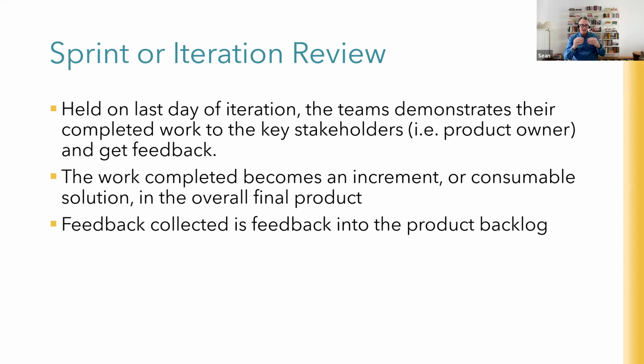Any feedback that's collected that requires major work that can't be fixed on the spot goes back into the product backlog, and the product owner may immediately put that back up to the top to come through in the next iteration if it's significant feedback. But certainly I know teams that for small changes will just do it right there on the spot during these iteration reviews. If it can be done quickly, there's no point putting it back into the product backlog.